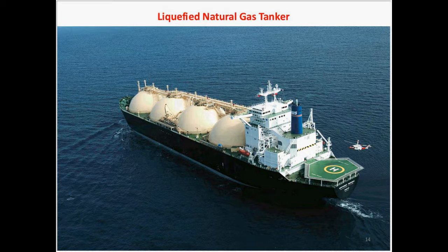This project started almost 20 years ago. Cost was $54 billion with a B, and from the time the gas was discovered offshore in the ocean till the project was developed, executed, and operated took about 20 years.